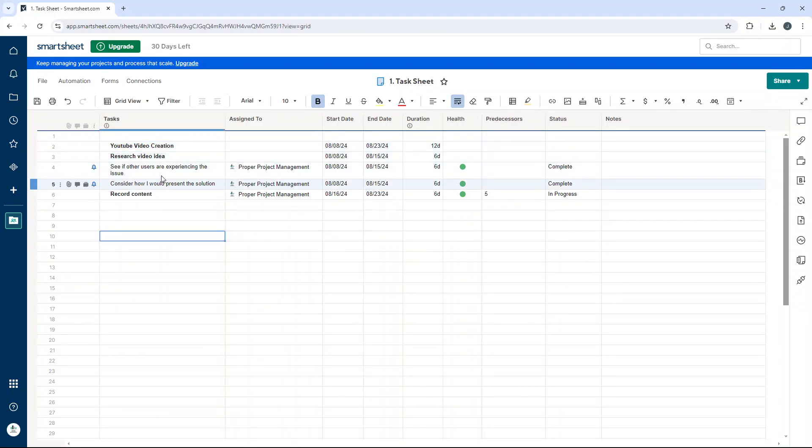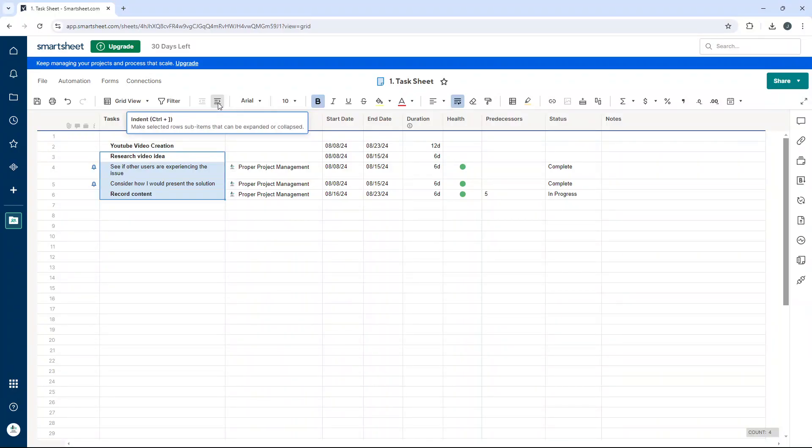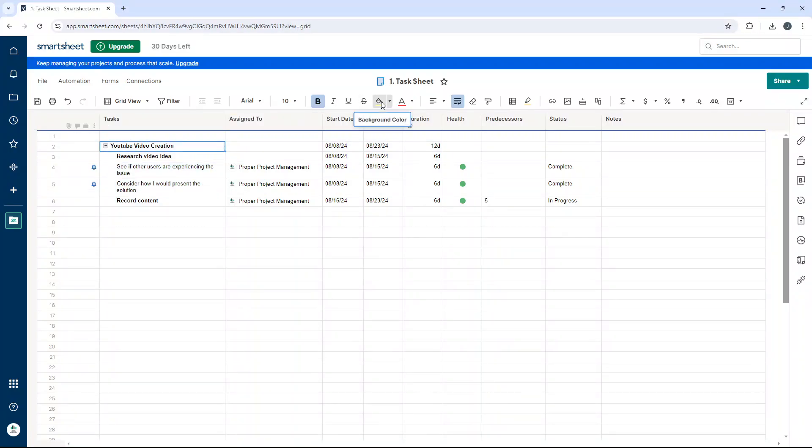So all you need to do after that is select every single row underneath where you want it to roll up. And then you just need to go to the top and find the indent button. Now there is a shortcut, which you can see on screen as well. If you wanted to use the keyboard shortcut, press this button and you'll notice we have now made this a parent row.